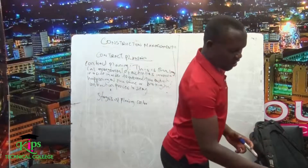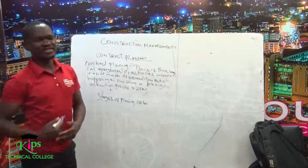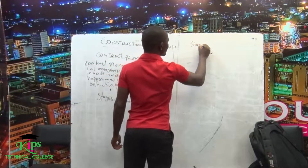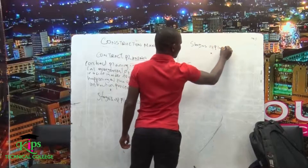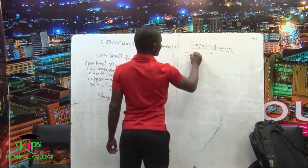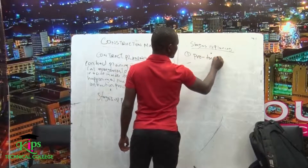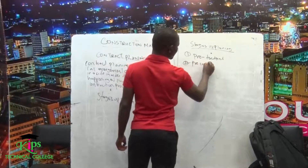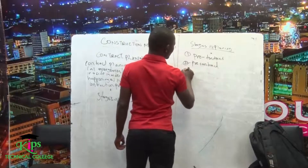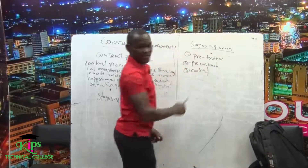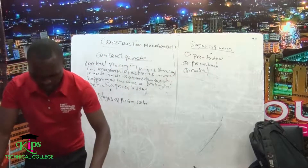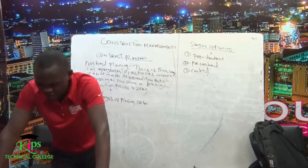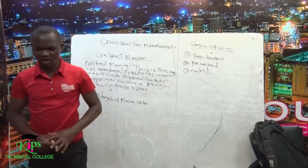When we talk about planning before the tender, it means this is the time that we have not done anything. Pre-tendering planning is the planning that is done between the notification of inviting tenders and the submission of the bids. It means you have to plan between when we invite tenders and the time the tenders submit their tender forms.